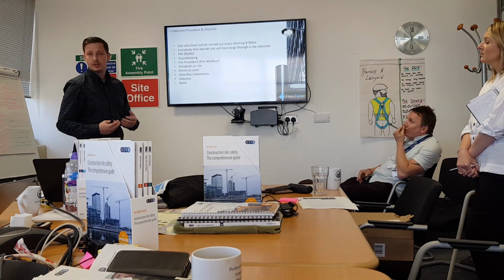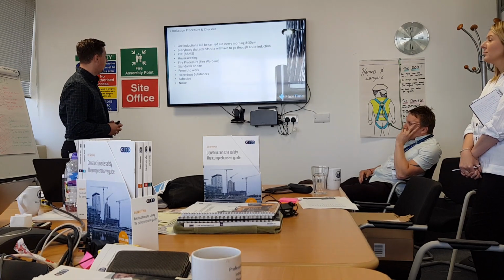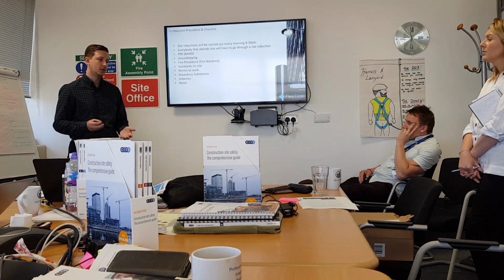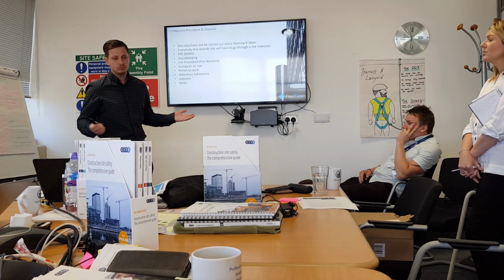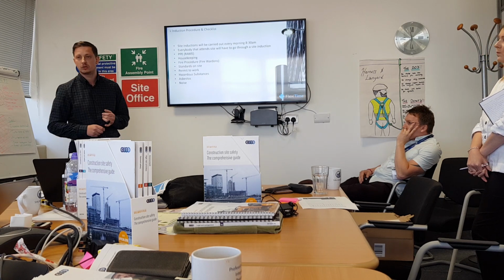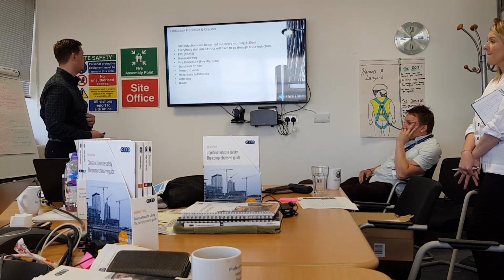So the last thing we want is anybody swearing and shouting and kids here in the local area. Permits to work will be run daily. There's no excuses, must be done. Sign in, sign off, no excuses. Any hazardous works, we do have asbestos on site, hot works, etc., will all be monitored through the permit to work system.